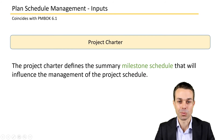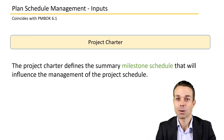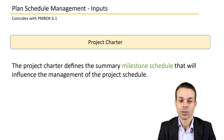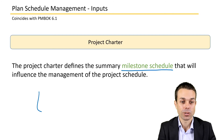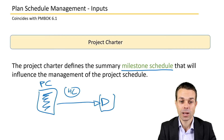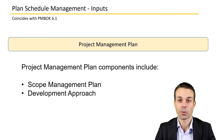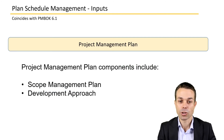Let's look at the inputs in a bit more detail. The project charter provides the summary and high-level detail, specifically the summary milestone schedule that we initially outlined to initiate the project. We made our project charter with a high-level idea of what it might take to deliver the project, so now we use that as an input into planning our schedule management to get a basic idea of what we might need to do.